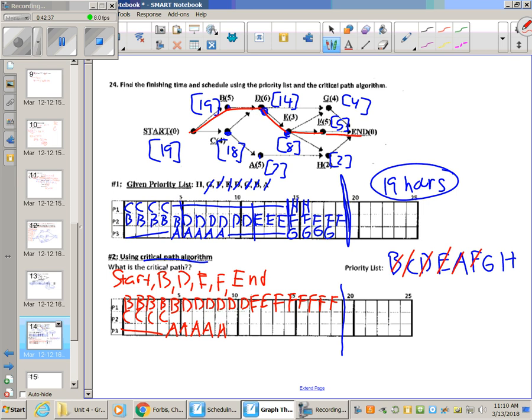Okay? So moving on to G, its prereqs are E and D, so it's got to be past both E and D. Okay, so it's got to be past hour, it looks like 17 or 13, I believe. So give it to P2 or P3. How about I'll just give it to P2 right here with a processing time of 4. And now G's out. Okay, G was past its prereqs, E and D. I gave it to P2. That means he must have been idle all the way up until that point.